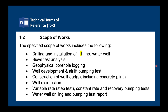Here's an example of the scope of works for a project we're going to be doing in Kabul soon. You can see we've just got a bunch of bullet points: we're going to drill and install one water well, do some sieve tests, some logging, well development, an airlift pumping test, construct the well head, disinfect the well, carry out some pumping tests, and finally produce a water well drilling and pumping test report. Note there is no bullet point for a pump house — so that's clearly outside the scope of works.